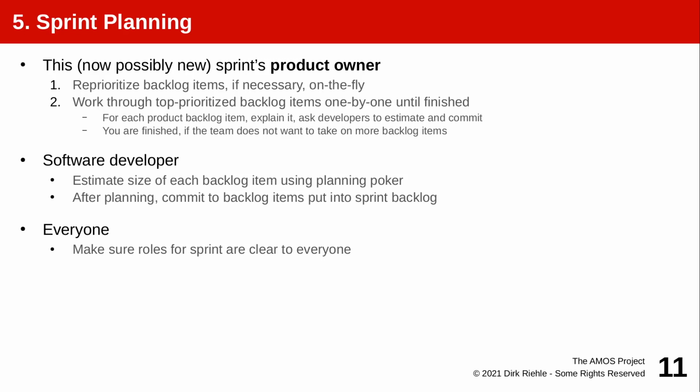So that, after a short exercise, the product owner now looks again at a product backlog where by priority they can see the features that they want the development team to implement. What they do here is they take the top feature and ask the team, can you implement it? Do you want to implement it?